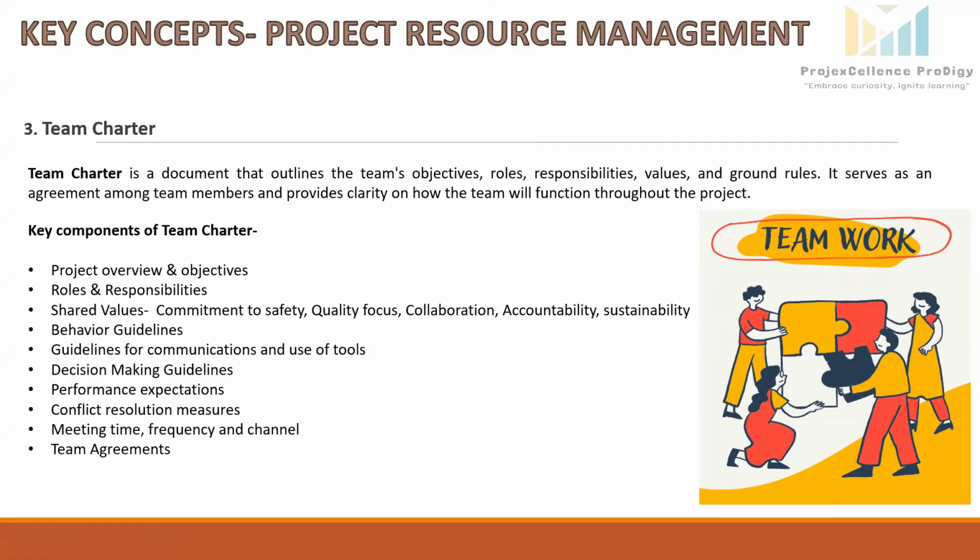Performance expectations, milestone based deliverables will be mentioned. For example, the procurement should be completed in 3 months. Schedule compliance like commissioning target date. Efficiency standards, minimizing the rework and optimizing the workflows. Budget adherence, preventing the cost overruns.